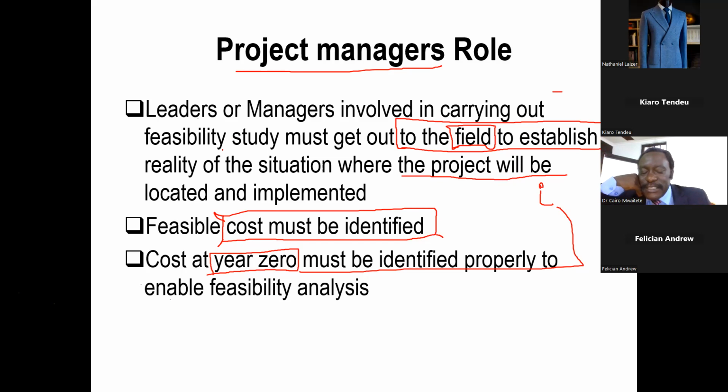Why do many engineers fail? I will keep on giving you the example. They cannot account for all the costs. Engineers' estimates are based on books. They pick the estimates for their BOQ that are derived from estimates, and these estimates are based on the AQRB. But we say when you assess, those costs are not feasible, because these people don't go to the field. I think Engineer Twaha and others can understand what I'm talking about.